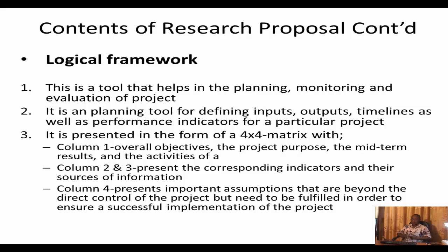Remember, as I said, you want something that will help you also monitor the project and make sure that it's being implemented as per the original design or enhanced form. So you want to develop some indicators by which this monitoring can be done. The logical framework is usually presented in the form of a 4x4 matrix. And there will be a column 1 that states the overall objectives, the project purpose, the midterm results, and the activities of the project. There will be 2 columns, 2 and 3, which present the corresponding indicators and the sources of information.